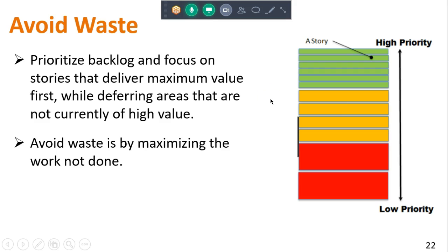So you just need to be mindful of having the appropriate level of detail at the appropriate time and at the appropriate horizon. We've talked about this before, that at the strategy horizon, you don't really need to know the details of how things are going to be implemented. It's about, from a high level perspective, can we achieve business value? It's not until you get to the delivery horizon that you really need to know the details of how something is going to be implemented.